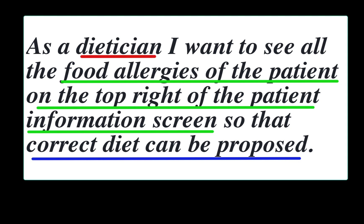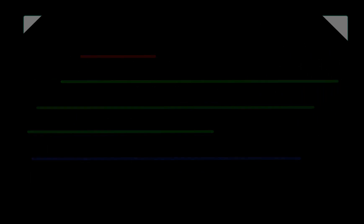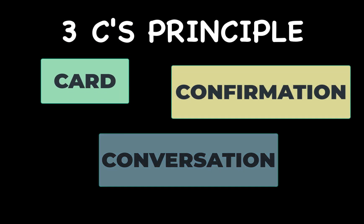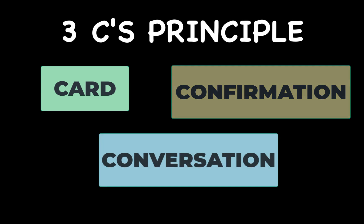Now we know the format of a user story. Let's also see how to write user stories with perfection. A very effective method offered by Ron Jeffries is the three C's principle. The three C's comprises of card, conversation, and confirmation. Card here symbolizes that a user story should be small enough to be expressed on a small 3x5 inch card, yet effective.